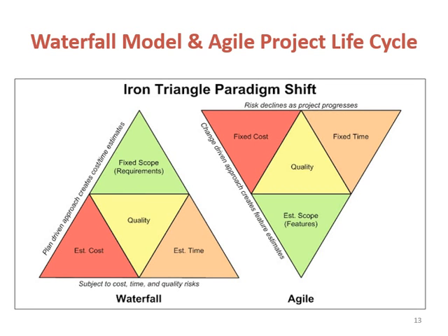But in Agile, we don't have the scope as a fixed parameter. It is a dynamic, or you can say variant, scope. The scope is not fixed. It is going to change, might be every iteration or every phase of a project. So you have to fix your cost and fix your time. We have a fixed cost. We can give you an example. Scrum recommends 5 to 7 team members, plus minus 2, so between 5 to 9, sorry. So your cost is fixed and your time is also fixed, because in Agile we follow time box.